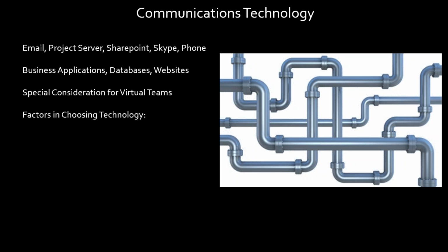So you have to consider certain factors when you choose technology, particularly for virtual teams. You're probably going to see a couple of questions on the exam about it. Urgency of the need to know is one of the choices, but also availability, okay? The availability of email may be worldwide, but video conferencing maybe not. Maybe some of the places where our projects are, there's no high speed. The availability of certain business applications, ways to get onto the net, and mobile apps may not be there.